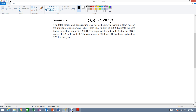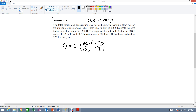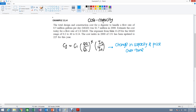We have the problem here. The formula is: C2 equals C1 times the ratio of capacity (Q2 over Q1) raised to the exponent X, times the ratio of indexes (I_T over I_0). Be careful — the exponent only applies to the capacity ratio inside the parentheses. Adding the index part accounts for the change in capacity and price over time.